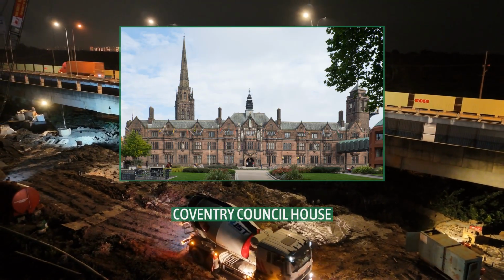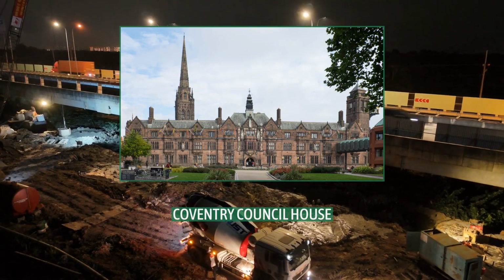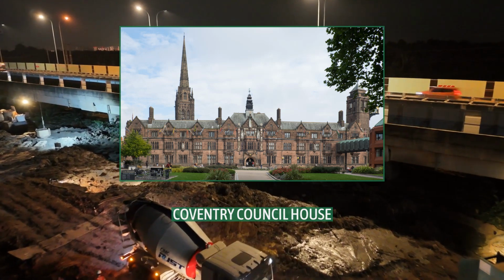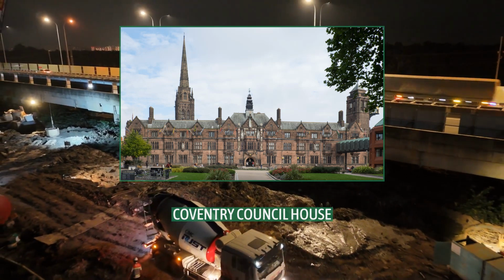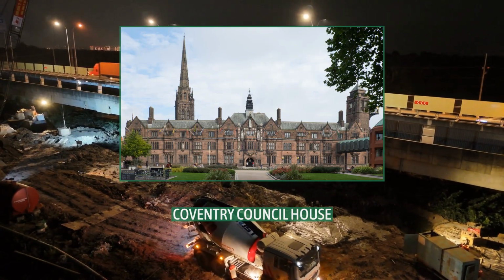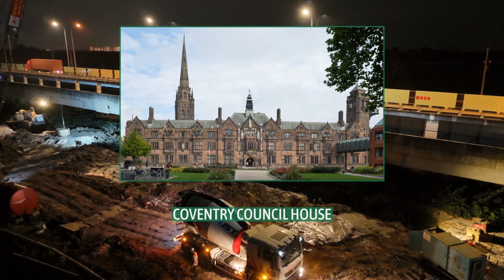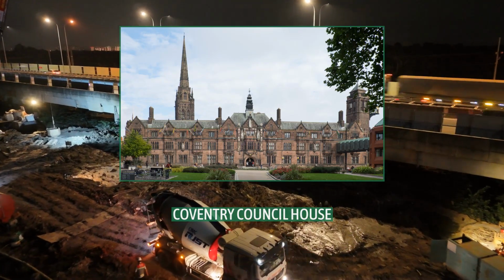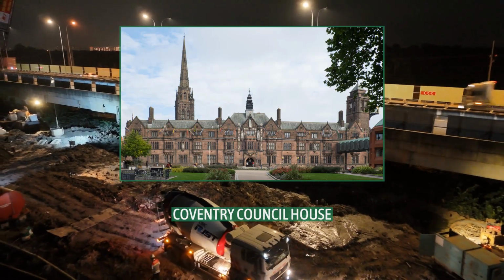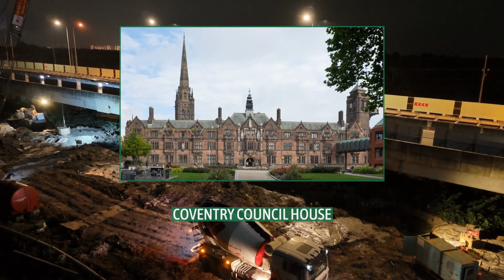After receiving MOT approval, the council began negotiations with businesses and homeowners along the proposed route to purchase their properties for demolition. Compulsory purchase orders were issued in June 1958, and by the end of the year, most of the affected properties were empty and awaiting demolition. The council also announced the closure of parts of Parkside, St Patrick's Road and Quinton Road for the duration of the project. By April 1959, demolition of unoccupied properties was underway, and the council served eviction orders on the remaining properties on the route. This included 5 pubs and several houses and shops.